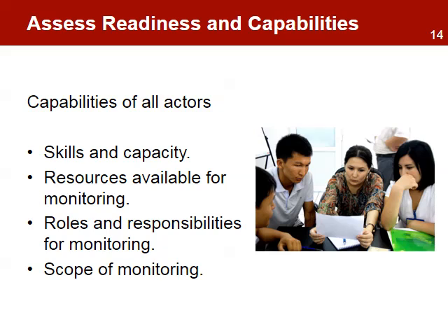This includes a review of the skills required of all actors that will be involved in the monitoring process, a review of the project budget assigned to monitoring and evaluation and other resources that are available, a review of the roles and responsibilities for monitoring of key stakeholders, and finally, an understanding of the scope of the monitoring requirements, including the needs of information from various stakeholders.